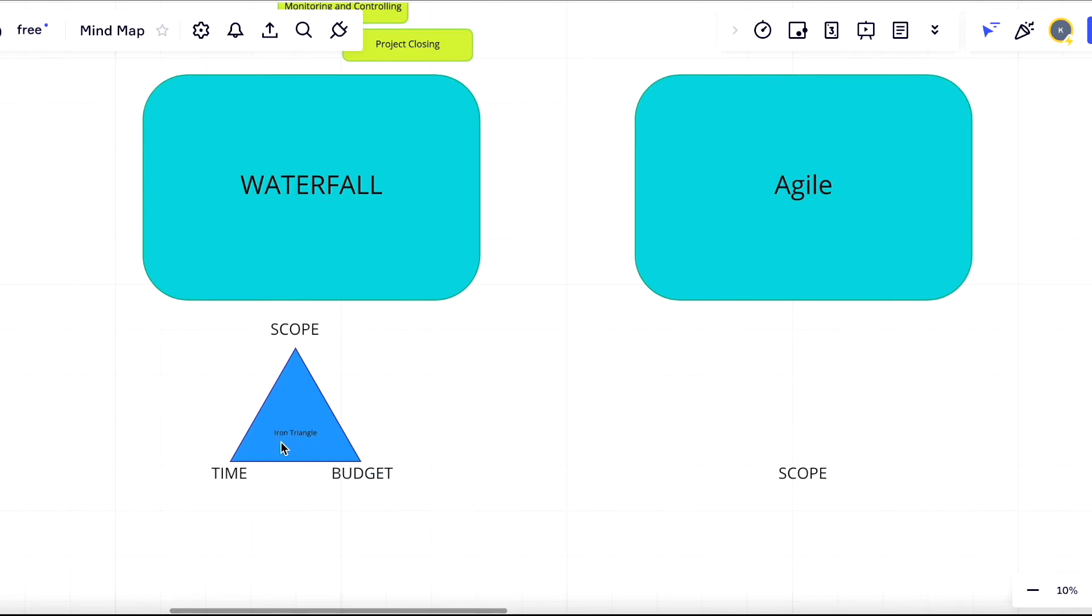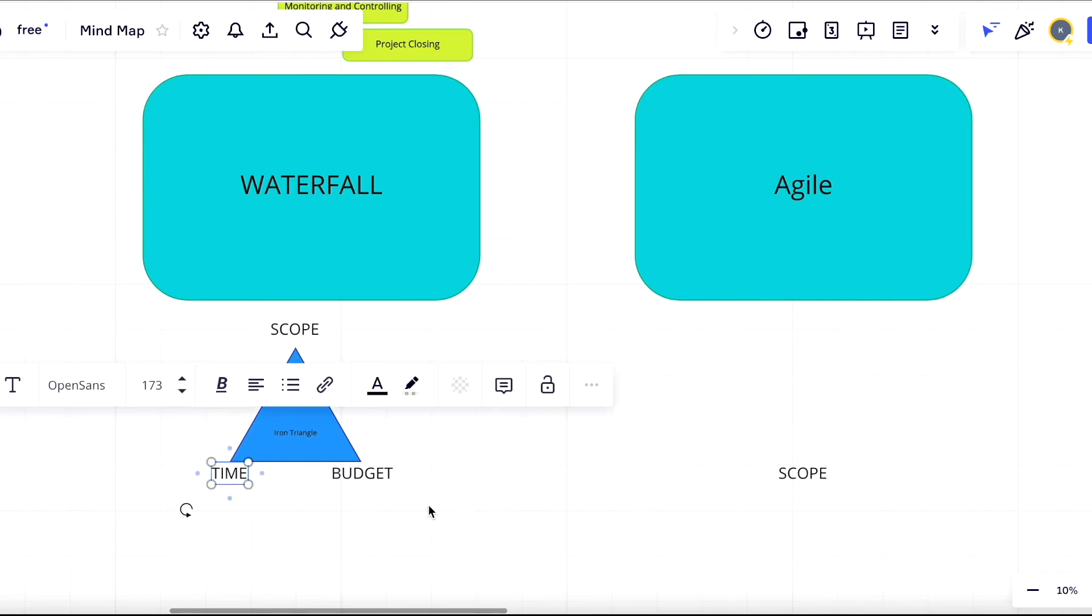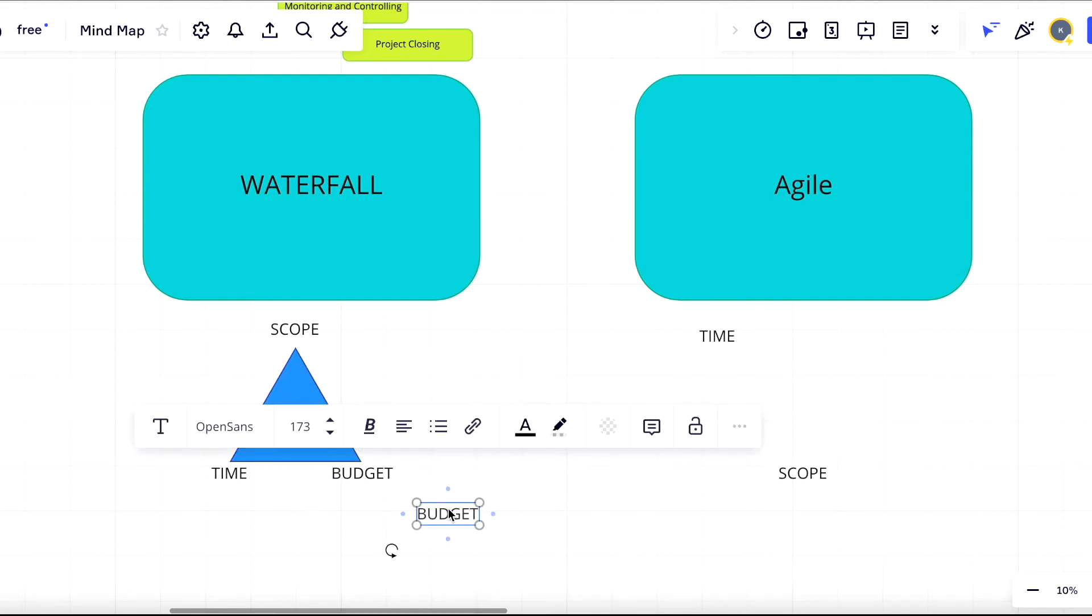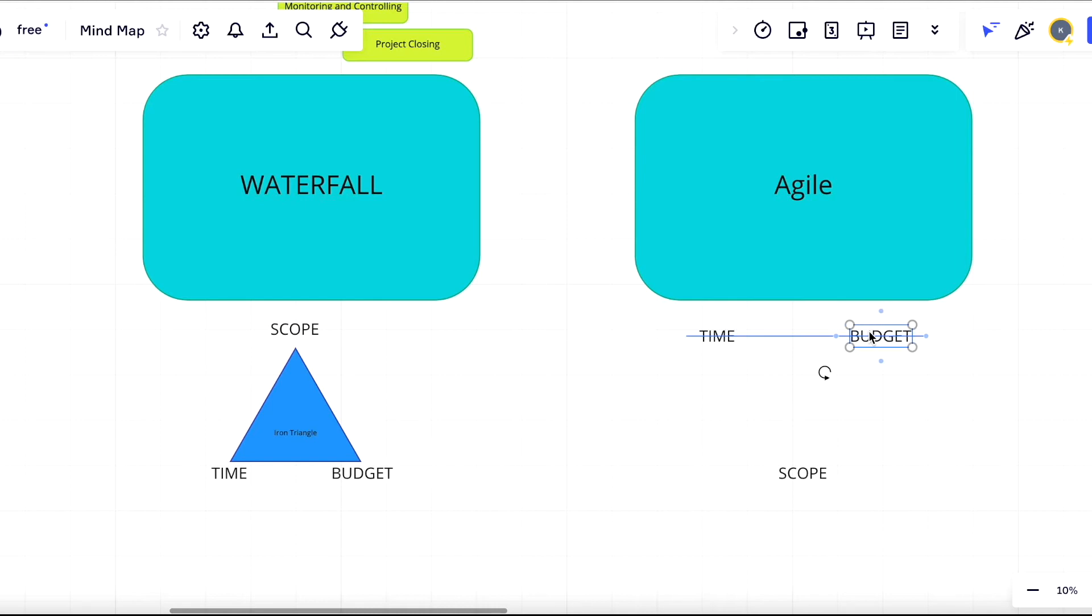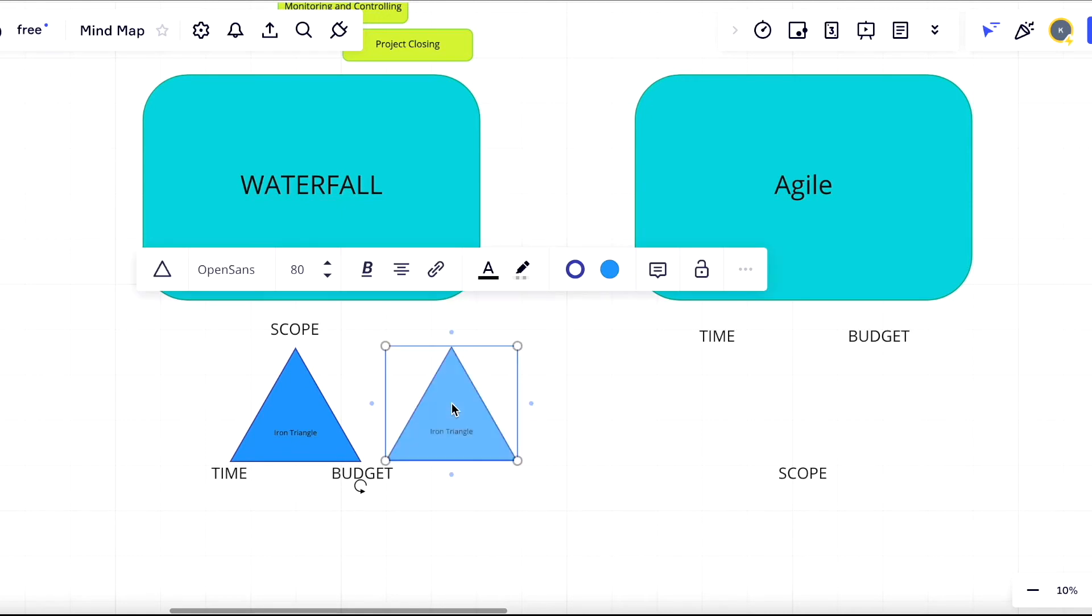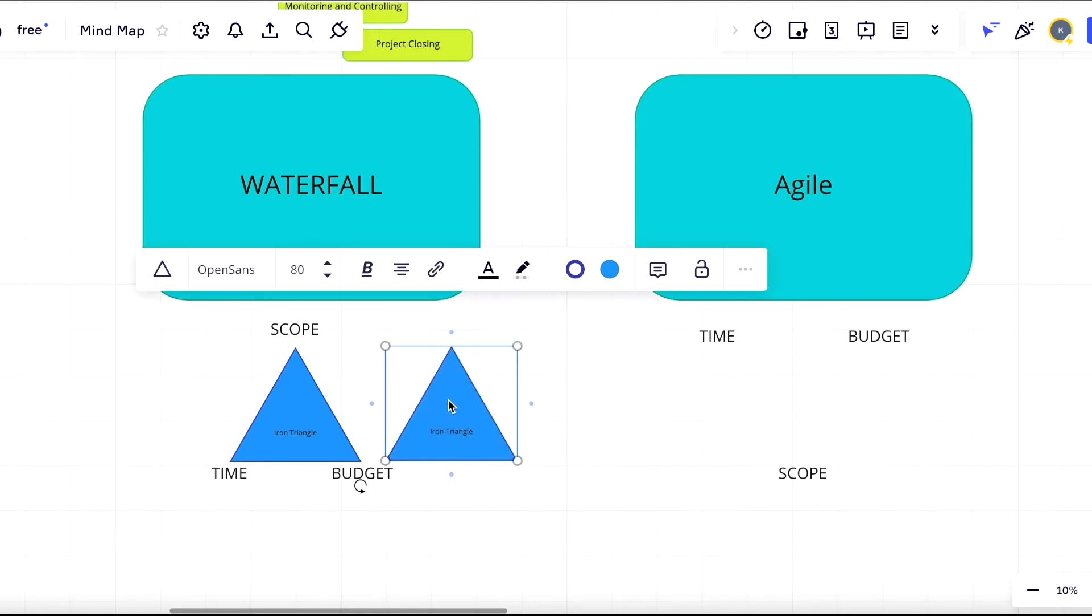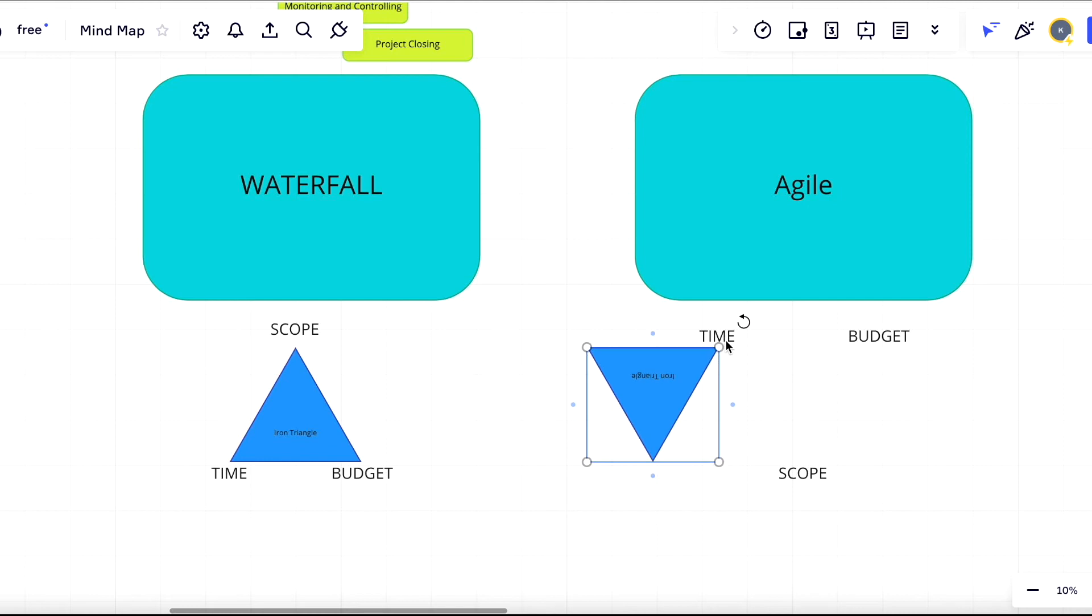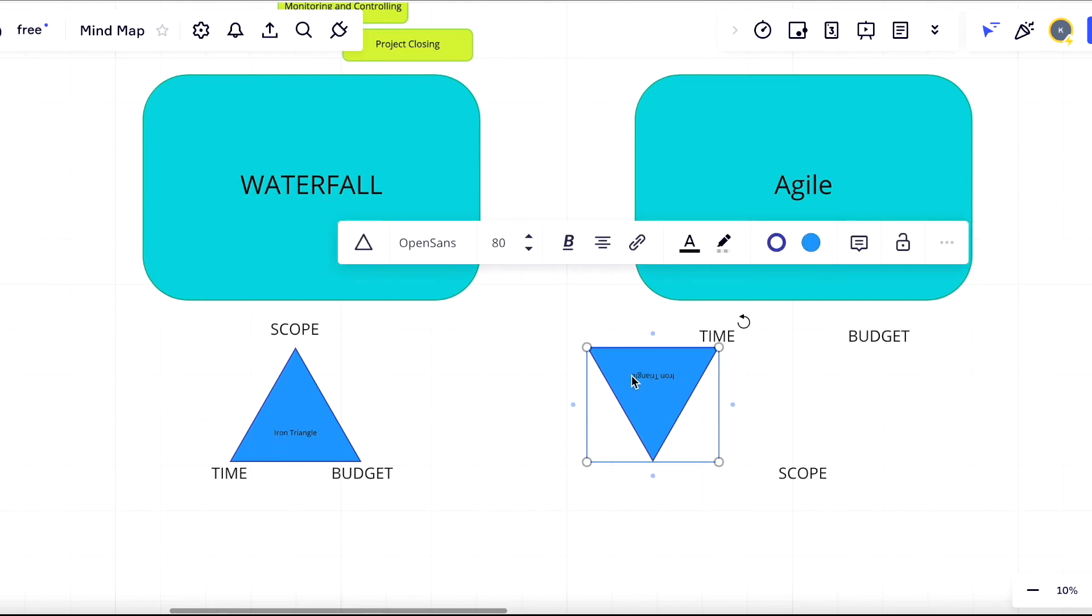This means that with agile, the key element we are accounting for is the project scope. But what about time and budget? We still have those values and they're still the project KPIs, but with agile we are welcoming changes. This means we are flexible with time and budget because our goal with agile is to deliver the better product by updating and optimizing the project scope. We still have the triangle, but with agile we call it the inverted triangle, as it has only one element in the basis and everything stands on the project scope.